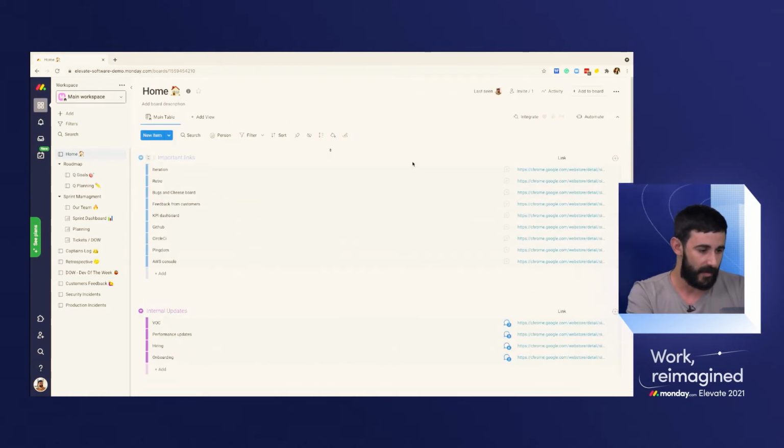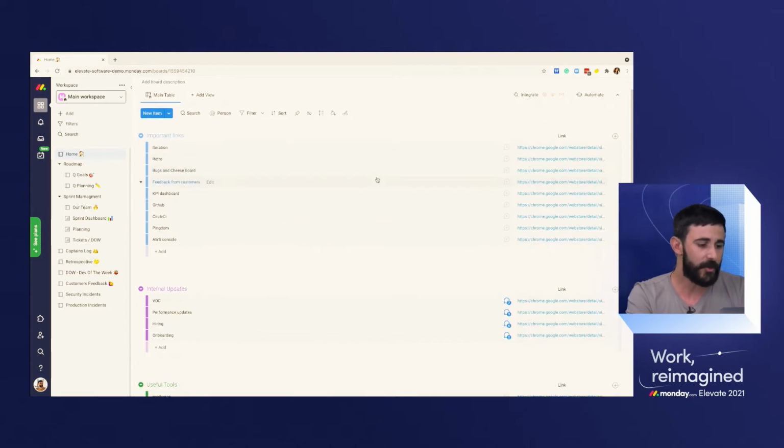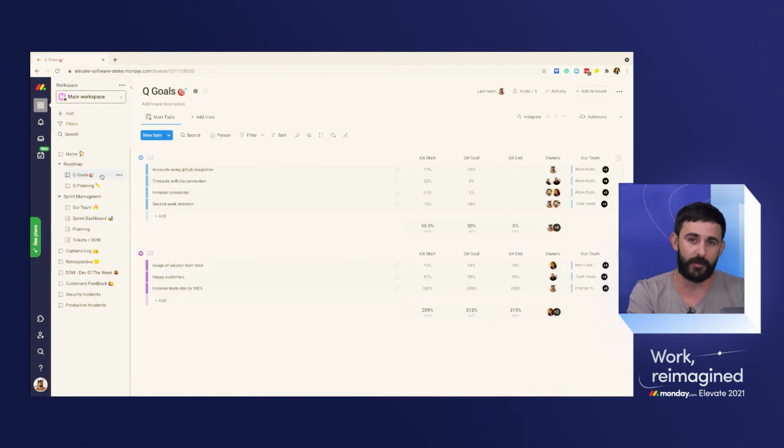So this is the home, and if you remember, I went over with you on the Scrum process. So I really want to start from the start of the process, and the start is the backlog. And what you have in the backlog is basically everything that you want to do in the future. And in Monday, we plan a queue ahead. We always plan according to queues. And in order to plan a queue, first we need to define a goal for the queue.